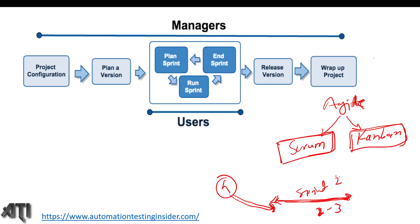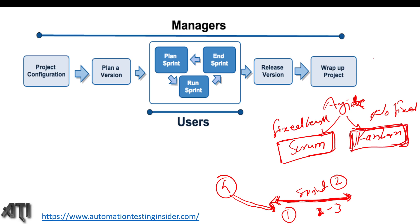Generally, a sprint cycle is two to three weeks — most projects use two weeks, some use three weeks, and some use one week. That is the sprint cycle duration where we deploy our build. Scrum has a fixed-length sprint cycle, whereas in Kanban there is no fixed sprint length. In Kanban, we deploy the build frequently without a fixed time. That is the basic difference between Scrum and Kanban.